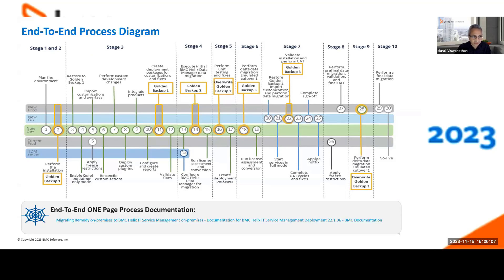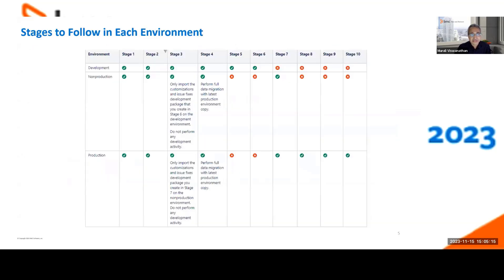This diagram shows the stages and main activities throughout the entire process. This table helps you understand what stages happen in which environments. For example, in the development environment you perform stages one and two — primarily preparing, planning, installation, and deployment — which you'll also perform in all other environments. Stage three covers customization, integration, and development work, performed only in the development environment. You can leverage the deployment console to export and create deployment packages to deploy in non-prod environments — QA, SIT, pre-prod — and similarly for production.